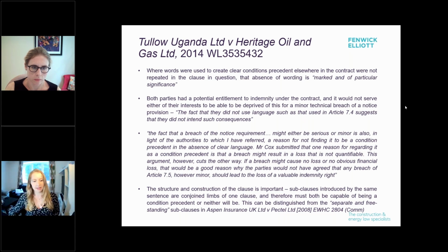In light of this, and to rectify it, the sale purchase agreement included a tax indemnity provision at Article 7.2. At Article 7.5, it was stated that upon becoming aware of a tax claim to which Tullow was entitled to an indemnity, Tullow shall, under 7.5a, provide notice within 20 business days, and under 7.5b, take such action as Heritage Oil may require to defend or dispute the claim. So, for example, comply with document requests to substantiate the indemnity.